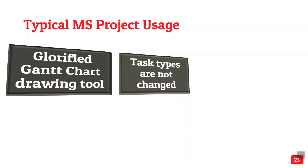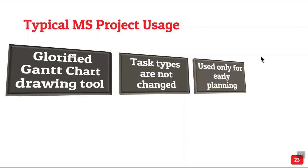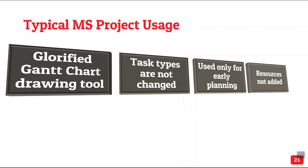Fixed duration, fixed work and fixed units. Most people don't even know what these three mean. And even if you know them, it's not enough to know them. For each task you have to decide the correct type. Otherwise the calculations are wrong.